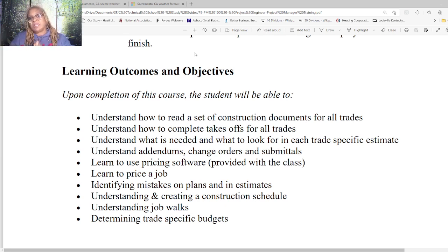And so you're able to take the construction schedule, the estimates, and the financials, and line them all up, and make sure you're in line. And if you're way ahead, for instance, if you're spending way more money than you know these operations were supposed to take on paper, ideally, then you know you need to make some corrections.